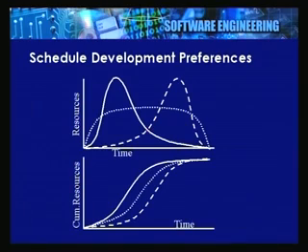So, here you see two conflicting views, one from the top management asking you to complete all the activities as early as possible, and there is an accountant who would like you to complete all the activities as late as possible. Now, what do you feel as a project manager? Again look at the slide, you have a totally different view of the situation. The first two views are not acceptable to you for a very simple reason. The resources required for completing the jobs are not distributed evenly over the lifespan of the project.